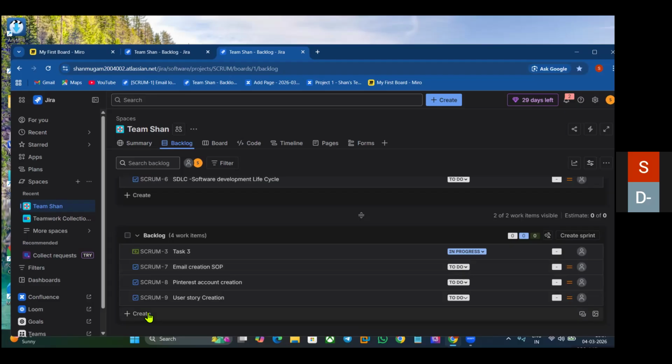Yeah. So you come here immediately the moment you know the requirement is good, or even if it is not complete and you don't know everything. You can just create one shell story, right? Let's say you are working on a credit card project and they just started. You are estimating there will be 50 user stories, and you can just come in and create one epic, and you can create the high level user stories, the main functionality, one or two user stories. You don't need to have more detail. We call them shell stories. You can just write the title.